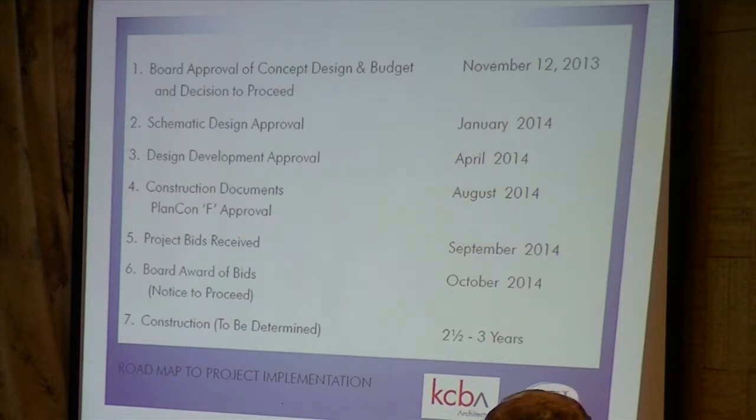Then the second item we would ask you to vote on would be a conditional item based on the fact that we get the $2 million from the ACE grant. If we get the $2 million from the ACE grant, we will then pursue the LEED Gold, but that will add a net $443,000 to the project. It's going to add $3.2 or $3.3 million, net of the $2 million. The end dollar figure after the reimbursements would be $55,444,000. But the net is what you're concentrating on.